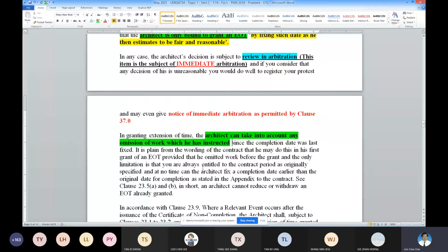The rule is this: once the contract is signed for 12 months, and even your omission is 10, 20, or 30%, you cannot reduce the original contract duration by 10 or 20 or 30%. You can't. You must stick to the original contract duration for the contractor. Okay? So this is something for you to remember. Don't think that using your common sense is correct. Totally wrong.